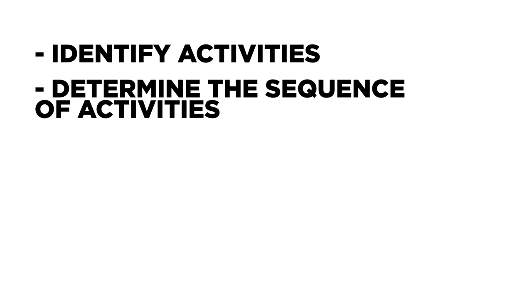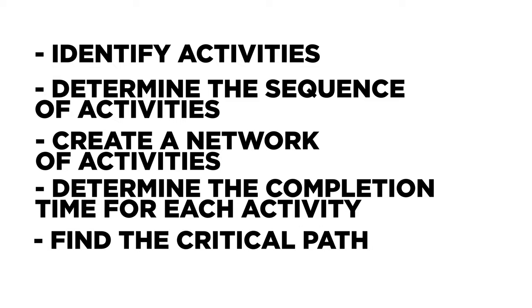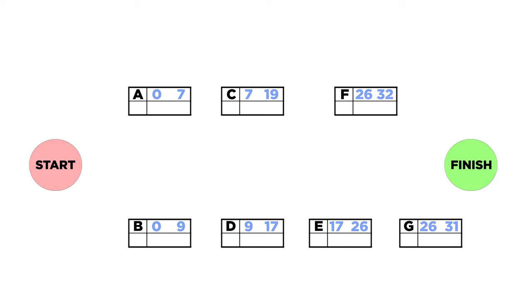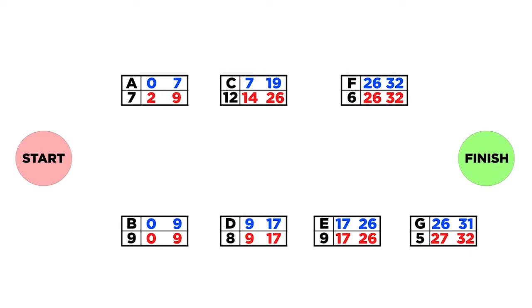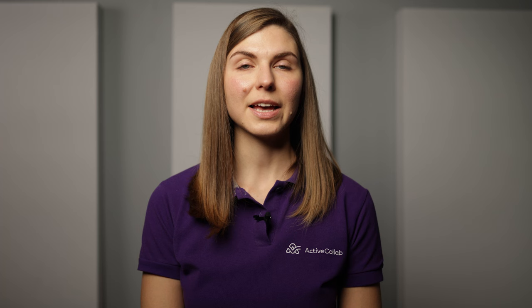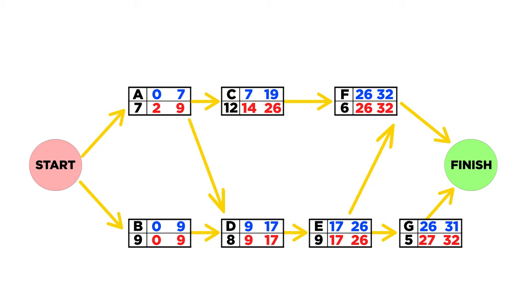The Critical Path Method consists of five steps: identify activities, determine a sequence of activities, create a network of activities, determine the completion time for each activity, and find the critical path. Let's go through them. Break down the project structure into a list of tasks and activities and determine the duration, time, and due date. Tasks that have nothing preceding them can start at any time. Some activities will depend on the completion of others. Putting them in the right sequence will give you a clear overview of their connection, and you'll be able to establish dependencies.